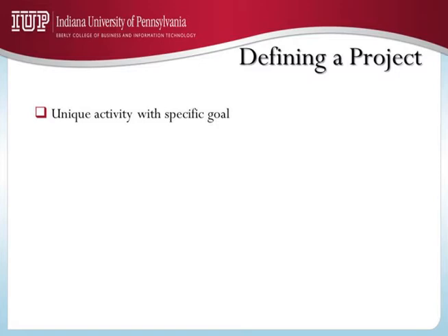That's a project too. The goal may include specifics pertaining to cost, time, and human resources. For example, you may not exceed $50,000 to complete a feasibility study for a product launch. Or you have to complete the project within 45 days. The project may be moving the warehouse from one location to another. Or you may have no more than 5 people to complete a product design project. So cost, time, and human resources. These 3 things are important.